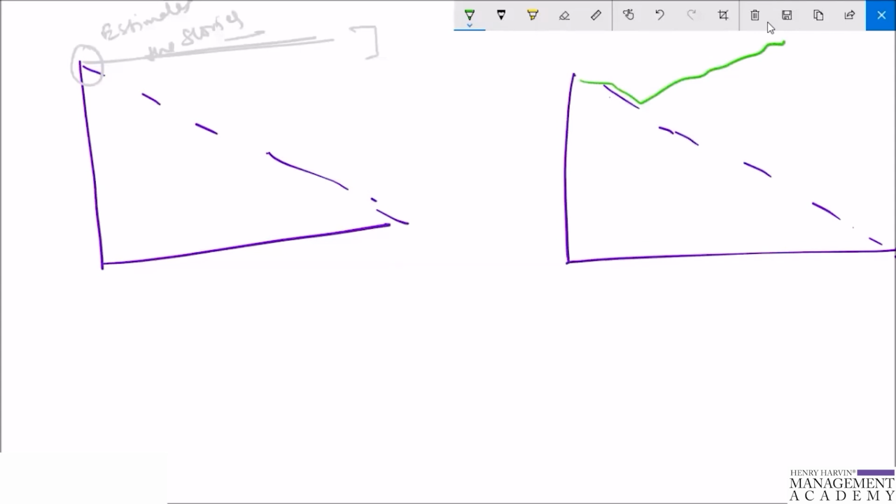Another reason might be that the tasks were re-estimated constantly during the sprint. And the mistake is that the team did not identify the problem that the chart displays, and the sprint backlog should be re-evaluated and rearranged immediately. A coach might be helpful as an experienced Scrum Master, and the product owner should facilitate this situation.